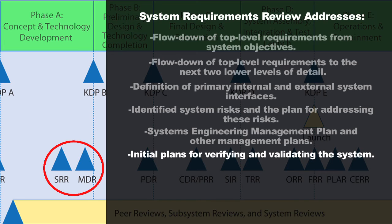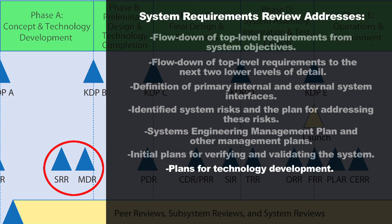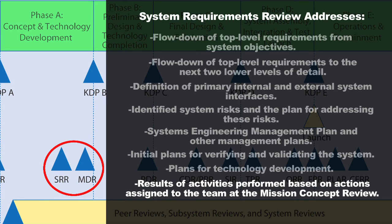You're also going to verify that the plans for technology development have matured and that you understand all the technologies that need to be developed and completed before the end of Phase B. The System Requirements Review will also look at the results of any actions assigned to the team back at the Mission Concept Review. At each technical review, the review team assigns actions to the designers — areas of concern requiring more work — and at the next review you want to make sure all those actions have been closed out.